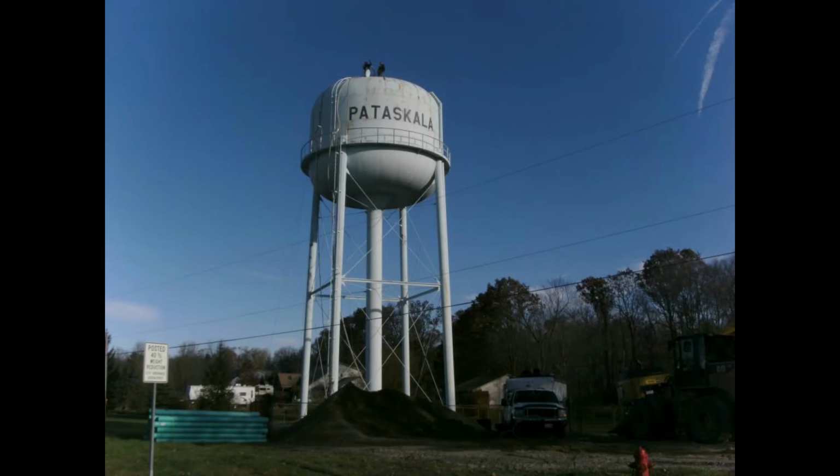And what that would do is alleviate about 15-20% of what's coming to the plant now, which would give you room to grow in the southern area of our service territory. And then we would build a new plant that would be expandable. You build it, but you could wall off a tank, make them smaller, and just service what that pump station would take to it until development came, and then you'd be ready for the development there.